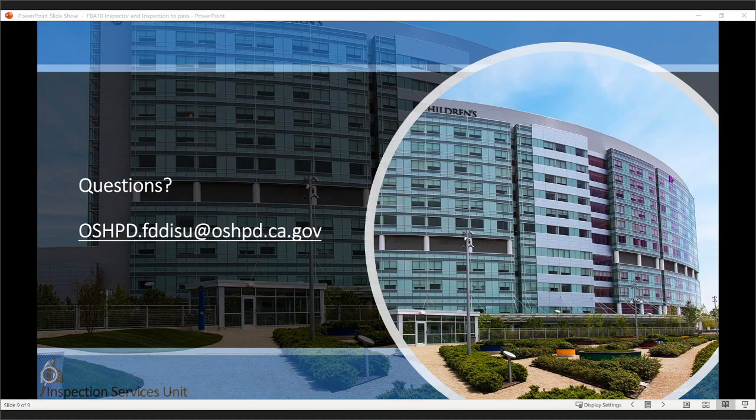So, an awesome tool. And you brought up schedule. I would say that's something I see often as an IOR on projects, is that the schedule shows the contractor putting the last screw in the wall on Monday, and on Tuesday they're seeing the first patient. So be willing to speak up in those early construction meetings and explain the time you're going to need to get closeout, and get the design team to back you up on that, because they're probably the only ones that also understand what goes into getting those final sign-offs from OSHPD and getting your occupancy. I agree. That's it. Thank you.